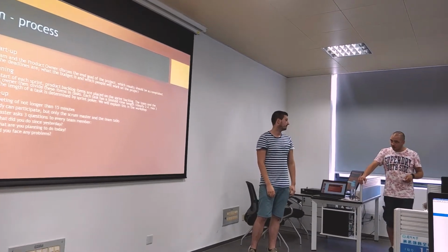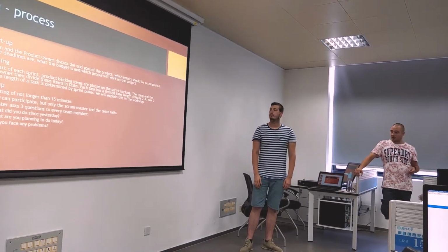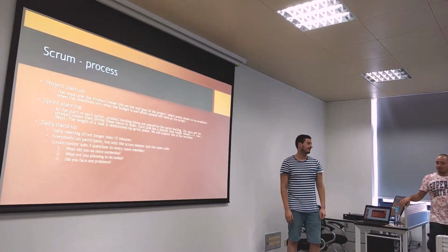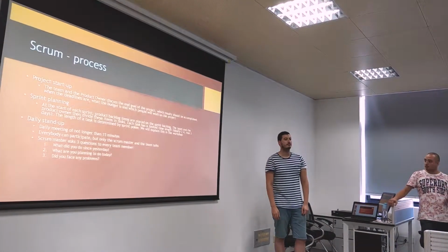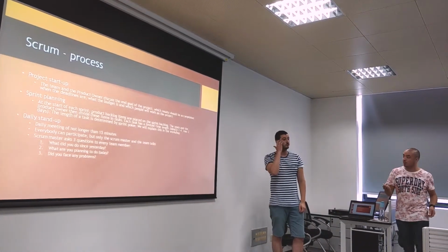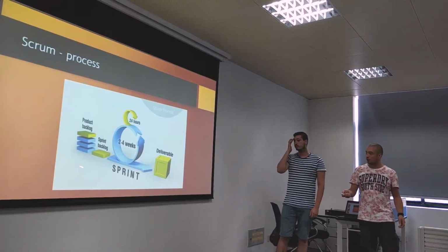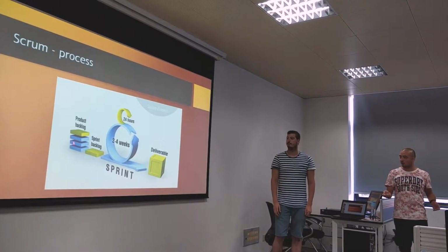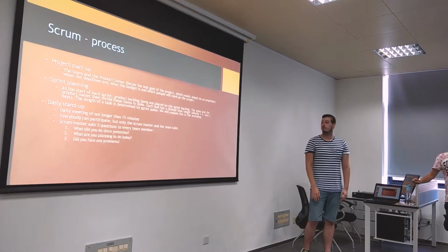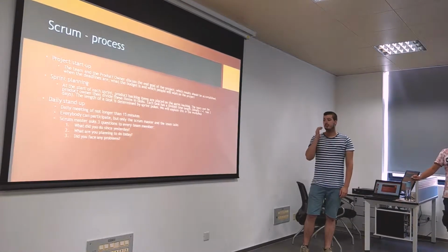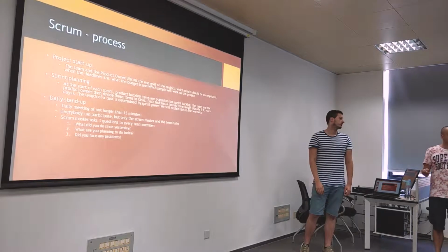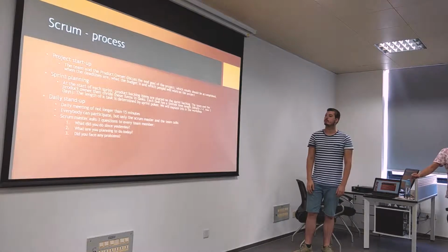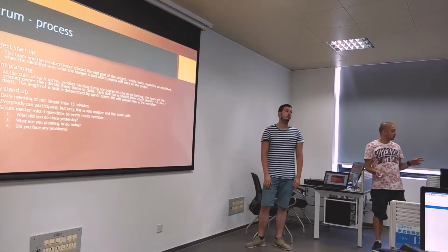The sprint planning is made at the start of each sprint, and during the sprint planning, product backlog items are placed on the sprint backlog. So that's here at the beginning. Items from the requirements list or the product backlog are placed on the sprint backlog. The team and the product owner together divide these items, or user stories as we call them in Scrum, into tasks, and we will explain how to divide items into tasks during the workshop later.